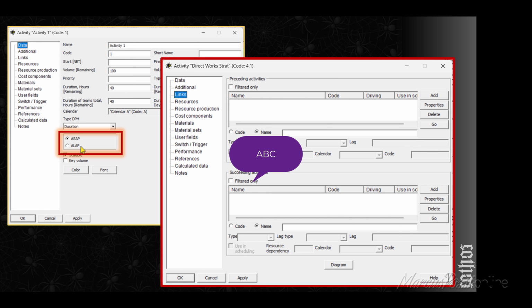Okay. As late as possible. Let me see if I'll be able to get an example. So let's say we are building a road, okay? And with the road, we need to install some street lights. Normally, these street lights come at the very end of the project, but during the progress, you have to be laying the ducts in preparation for the street light installation.